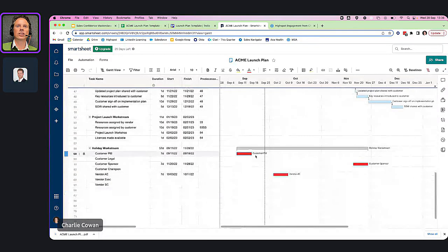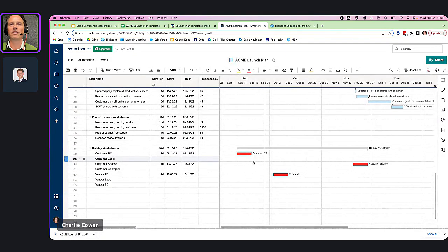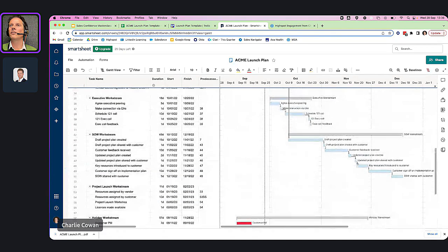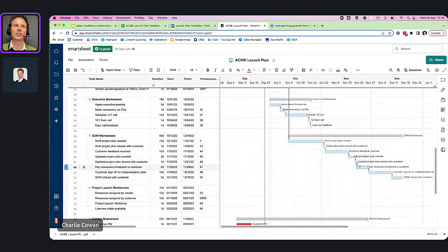I called out holidays earlier. Never forget this. It's always something that can catch people out, and it's a really good question when you're speaking with customers, just to make sure: has our sponsor, has our legal representative got any holidays coming up? And then scroll up. Is this person required for any of this activity at that particular time?